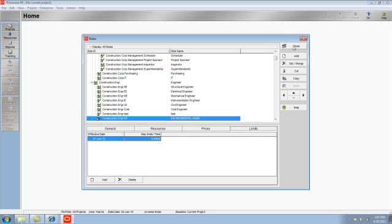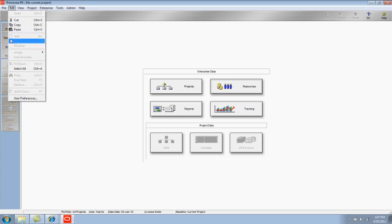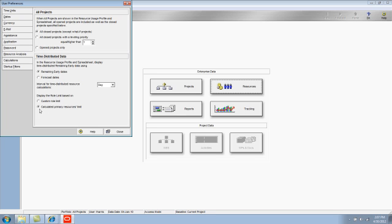If I close the role window and go to Edit, User Preferences, and I look at the Resource Analysis tab at the bottom, I can identify my preferred method as a user of displaying the role limit. So the role limit can be displayed based on a custom role limit or on the calculated primary resources limit.